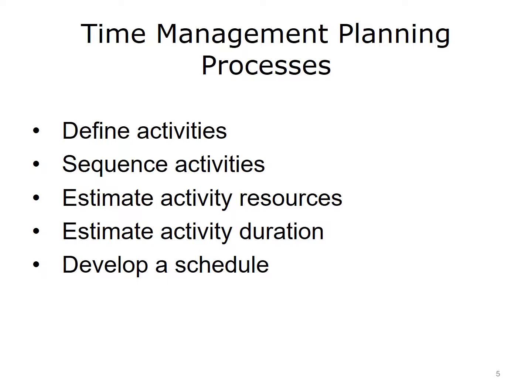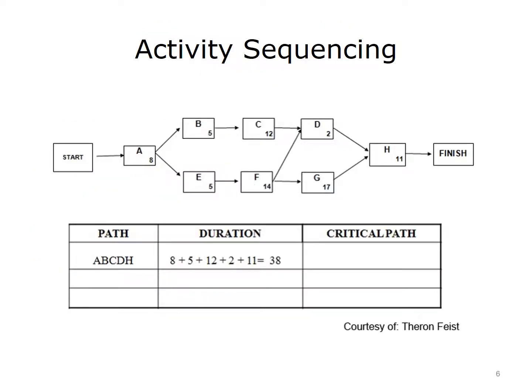When the WBS is created, the scope of the project is decomposed to the work package level. The work packages are further decomposed into activity lists, which help develop the project schedule. This diagram is an activity on node diagram. Boxes represent activities, and arrows connect the activities and show dependencies. This is a very common method for performing project scheduling.